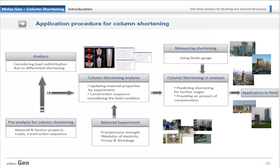In practice, the procedure for column shortening is: firstly, perform initial column shortening analysis with code-based material and section properties, loads, and construction sequence. Observe analysis results of load redistribution. Then update material properties by material experiments of compressive strength, modulus of elasticity, creep and shrinkage. Rerun column shortening, predict shortening of further stages, compare with shortening on site, and then update the model by providing an amount of compensation to be applied in the field.